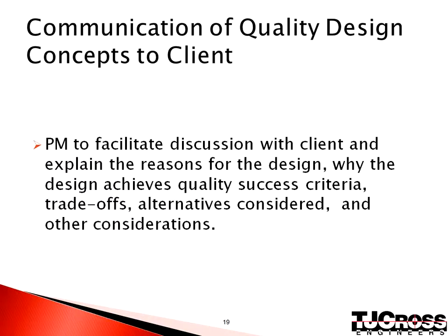Google Earth and SketchUp should be used only during feed and scoping. They will not replace obtaining survey data, field verification, or using CAD, PDMS, or CADWorks during detailed engineering. Please be aware that Google Earth has limited accuracy and may not have updated information. However, these software tools can be used to get us headed in the right direction of a quality design.